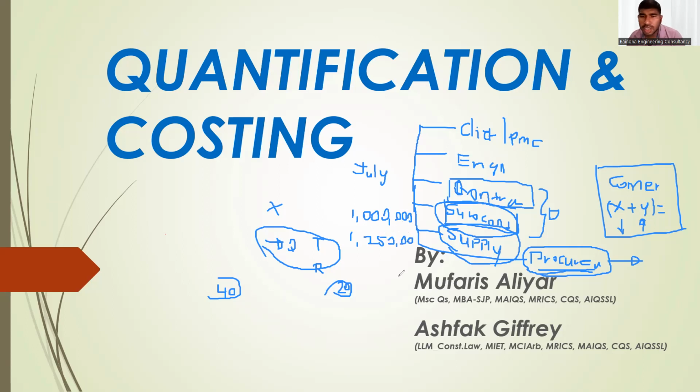Okay. So here there is a 250,000 that exceeds your cash flow forecast, so you cannot pay the subcontractors this 250 because you don't have the money. You didn't get the money from the client. You get only 1 million. This is your plan of outflow at the end of July, but your subcontractor submitted 250.